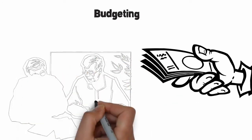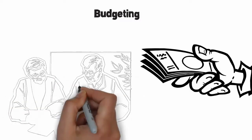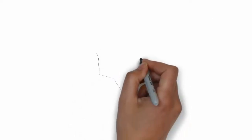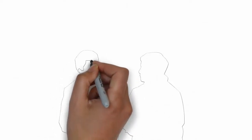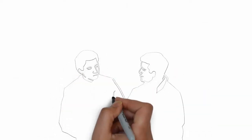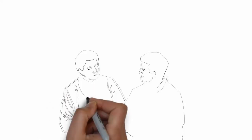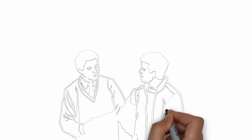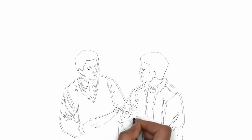In the budget, there will be several items listed as allowance items. These are related to personal choices like color selections, appliances, landscaping, etc. The allowance part of the budget is the most open-ended based on your final selections of these elements. We try to give you the most accurate estimate possible, based on our discussion of optional items and the styles and brands of products you want in your home.